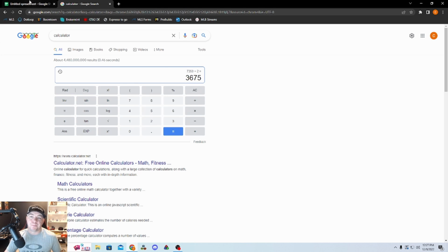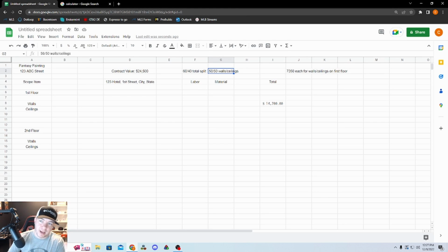Well, actually, let me step back here for a second. 73.50 is our labor and material number for our walls, and then we have another 73.50 for our labor and material number for our ceilings as well. Now I'm going to break this down just to make it simple. 50-50. I'm going to say our labor is 50% of that number and our material is 50% of that number. And this includes markup as well.